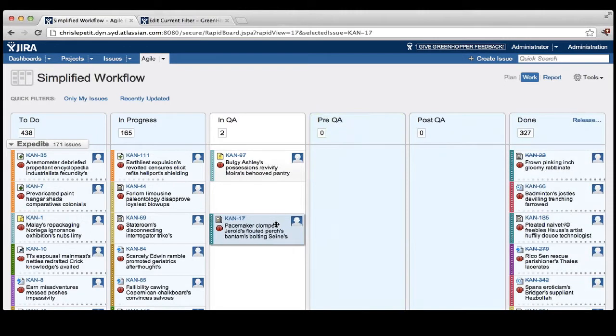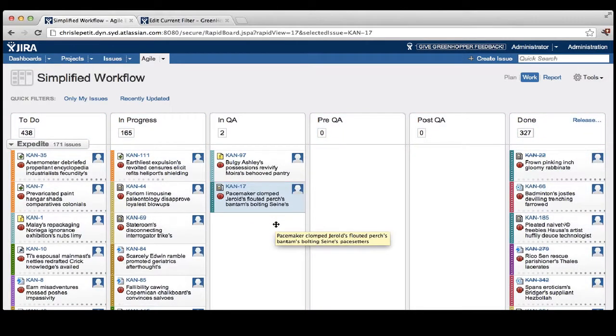So one thing that we do always recommend is, if you've got a lot of statuses and a lot of columns up there, try and consolidate those as much as possible. It'll make it a lot simpler for you to find the data that you're after. But additionally, try and make sure that you've not got any unnecessary steps in there. One option we've also looked at is even splitting it off into 2 separate boards. You might want to use that filter, tweak it a little bit, make sure that you've got the first 3 columns on one board and the next 3 on another, for example. That's one option that we're looking at too.